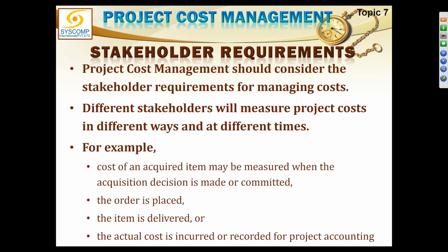Whereas the client, the customer, is not bothered how much money is spent because he has to pay the agreed amount. So if you are spending more and he is getting quality out of it, he is satisfied with that. Rather, he would force you to give him the quality no matter how much you spend. But if he is asking you something which was not agreed in the specifications or requirements, then you will charge him extra. You will move a change request for the renegotiation of the contract. But within the agreed terms, he is not bothered how much you are spending.